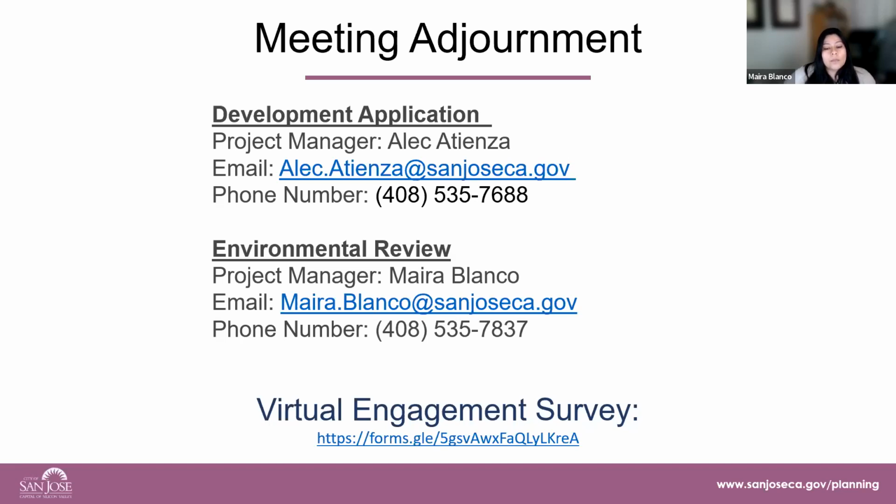on the NOP. The project will also include a level of service analysis and will include qualitative assessments of things like on-site circulation analysis, parking evaluation based on the city code parking counts, as well as conformance to all of the city's plans and policies put in place for traffic and transportation. And then I also wanted to just touch on the noise analysis. So there was a comment about establishing baseline. The noise study will do that. It will characterize the existing sound environment to establish a baseline, and we will go from there.